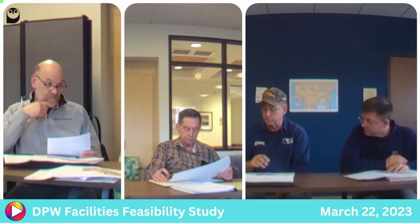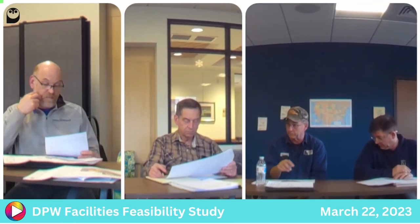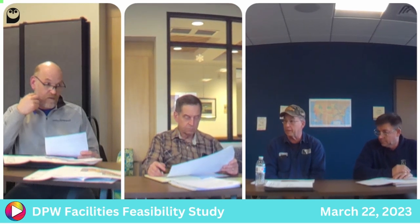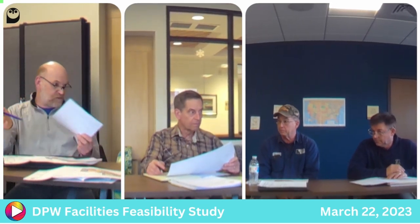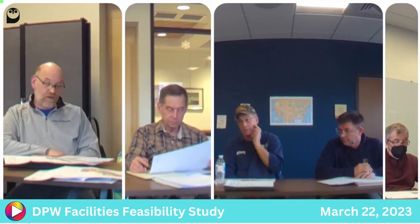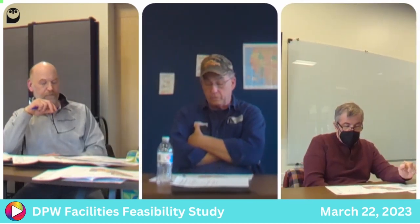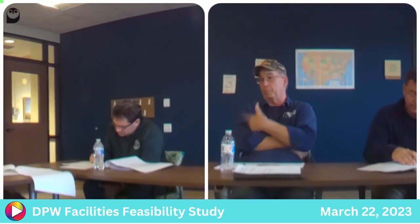Roughly, if you're using the 500 per square foot, say you added 3,000 square feet to that part of that building, you're looking at about $1.5 million more. Again, because it's cheaper, it's maybe a little less than that. In reality, that building shouldn't cost that, because you're not putting $500 a square foot into it. Correct, it won't. The $500 a square foot includes the site work and the fuel island and the salt shed, so it lumps all that together. I understand. So you'd be making that like 25% bigger for maybe another $1 million, give or take.